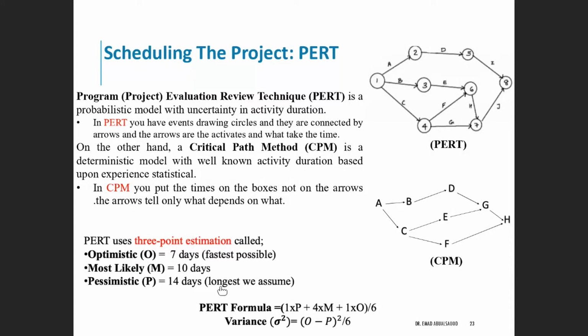So you have to put a three-point estimation for each activity. This is usually done by the team and the stakeholders of the project, not by one individual person putting them arbitrarily. It needs some discussion to know the resources needed for each activity. So we have a project that contains a model, a report, and a presentation. You have to test the model. On those activities or deliverables, if we are going to use PERT in this case, each one of them needs to have these three-point estimates.